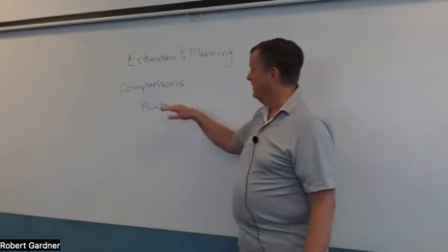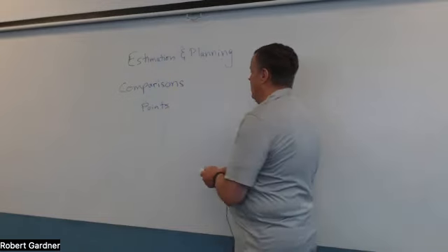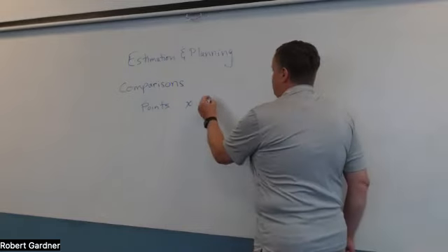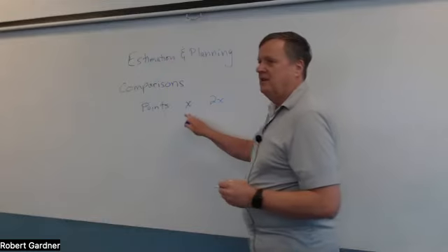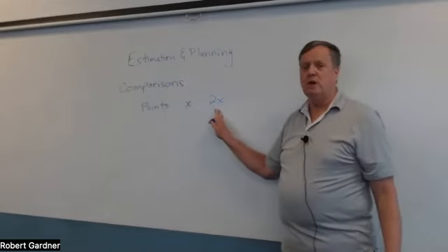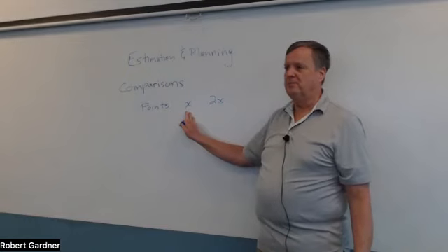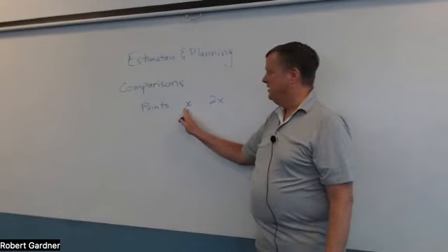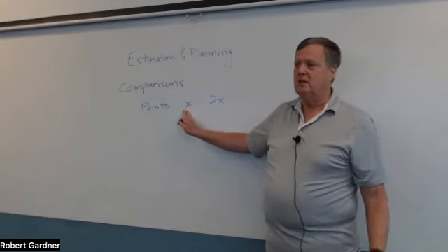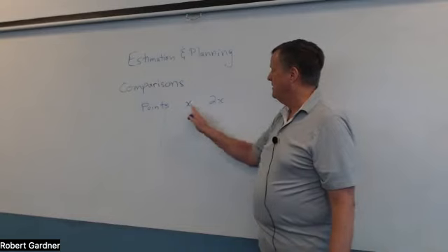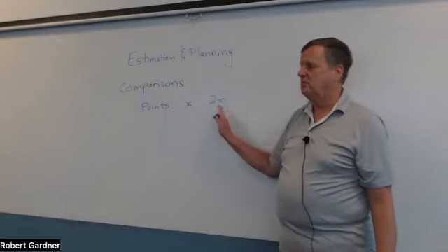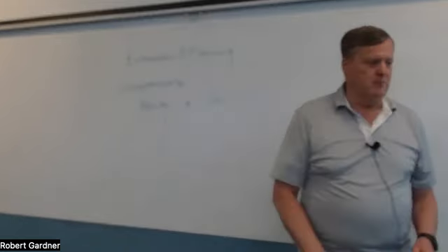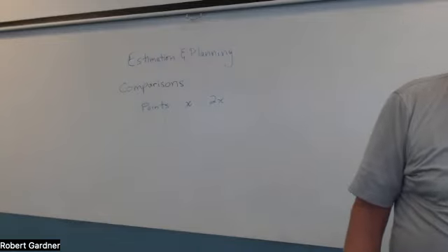They are designed in such a way that if I have a task that has X points, and then I have another task that is 2X points, then this second task should take roughly twice as much time to finish as the first one. So this ratio between the points is important. Although we have no idea what X represents, how much time or anything else, we know that if I have an X task and a 2X task, this one will take twice as long as that one.